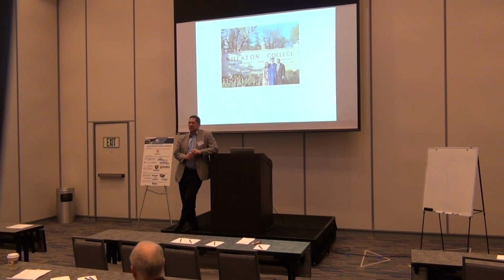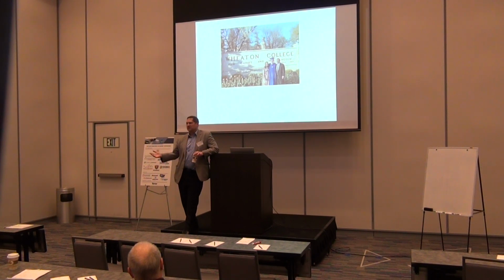So I would generally advise a subcontractor not to have a pay if paid. Where I've seen it get really bad, if it's 1 month, that's one thing. But I've seen it where, well, we're slow, they're getting some more funding, and then all of a sudden you're 90 days out. And now that's a huge chunk of money, and the general contractors, of course, they want you out there because they're not on the hook for that. So it would be one of those things that I would try to negotiate out, or at least have a conversation, or at least know what you're getting into.